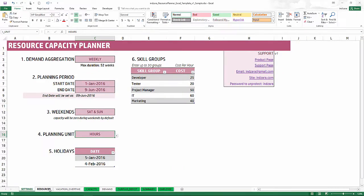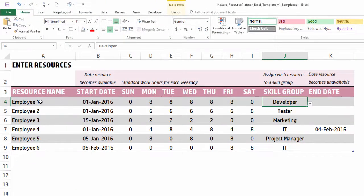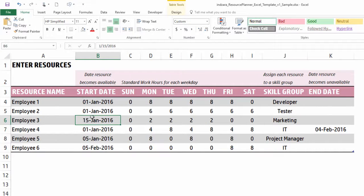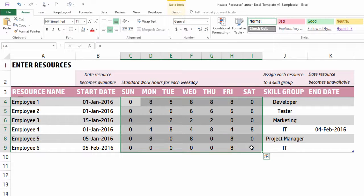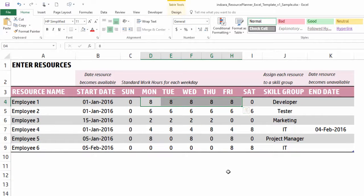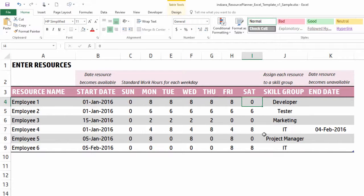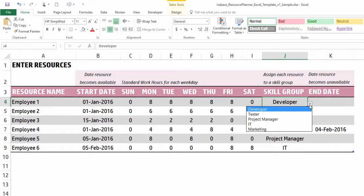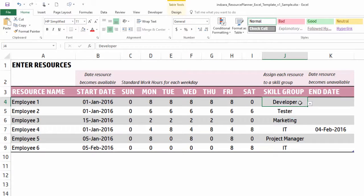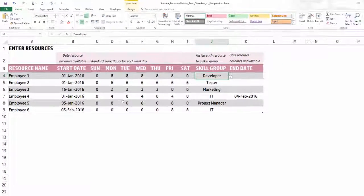Next is the Resources sheet, where you can enter up to 100 resources. You enter the resource name, the date when the resource becomes available, and an end date if the resource leaves midway during the planning period. If a resource joins the team midway, you enter their start date — this is very flexible. You also enter the number of hours each weekday the resource is available, and assign each resource to one of the skill groups set in the Settings sheet.